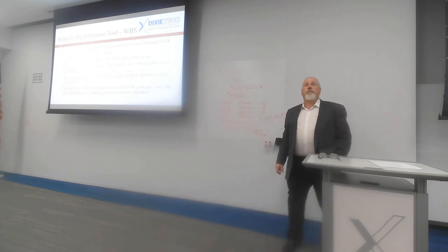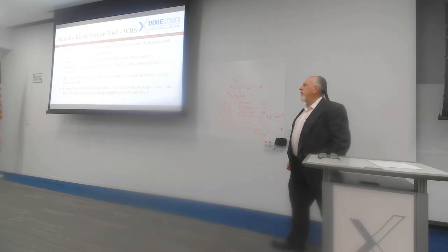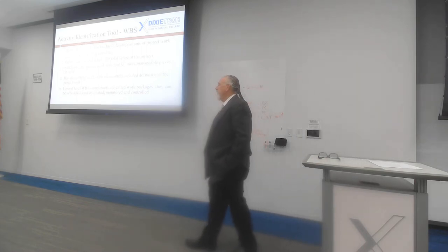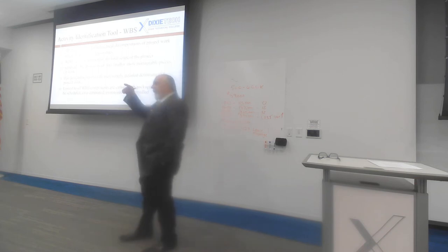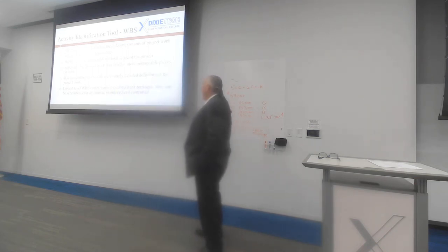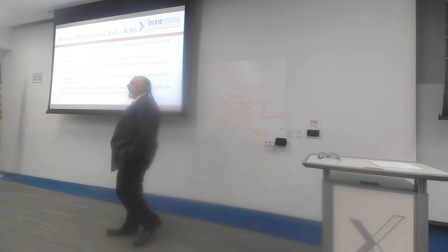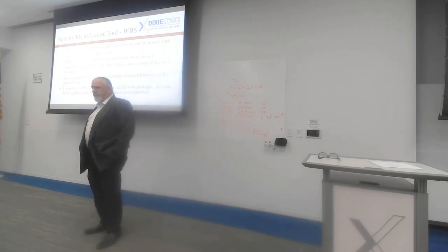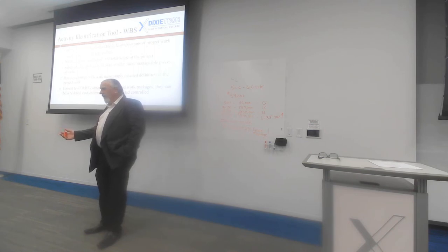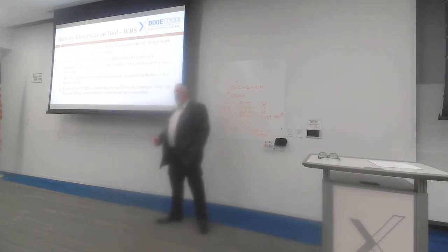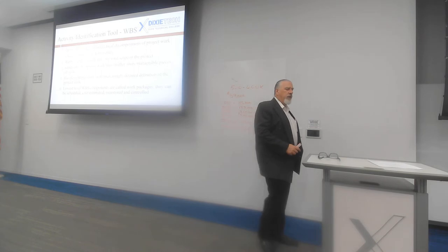The work breakdown structure that you are going to do is the map of those activities, and usually it's pretty not fancy, just boxes connected to each other, right? It looks kind of like an org chart. It's boxes connected to each other, and we call that decomposing the work, meaning we break the work down into the smallest bite sizes that we can, so that we know exactly how we're predicting where we're getting the time.